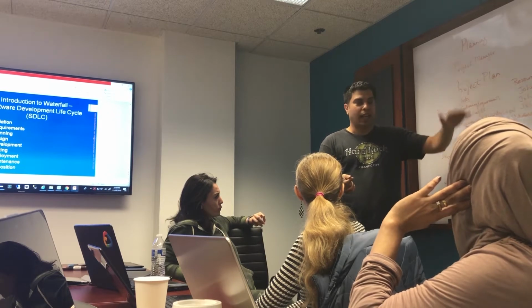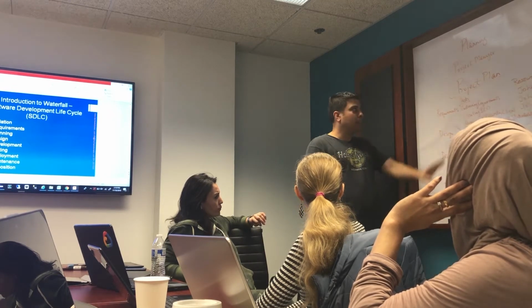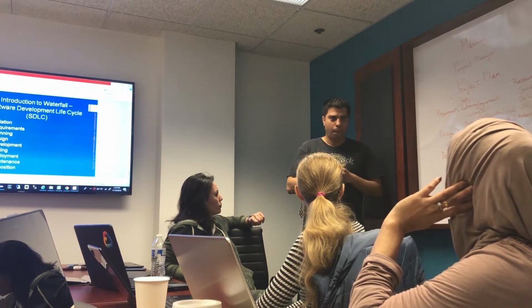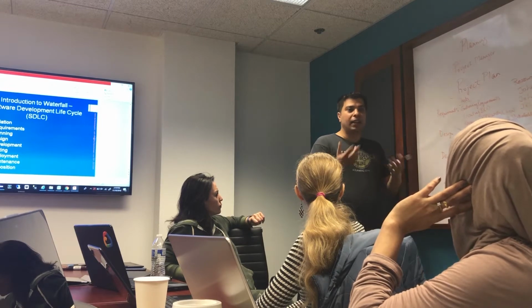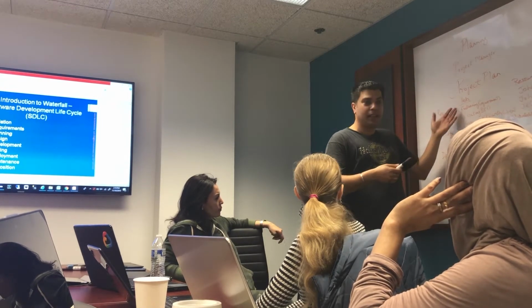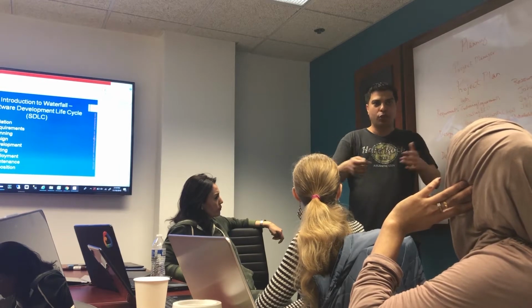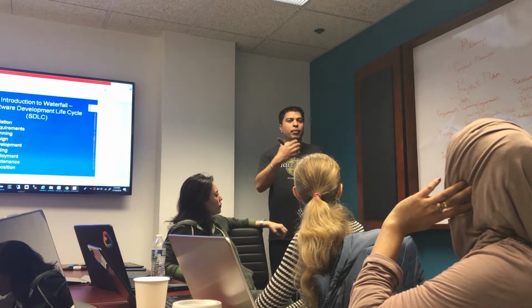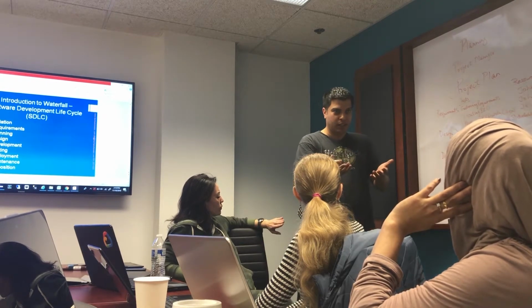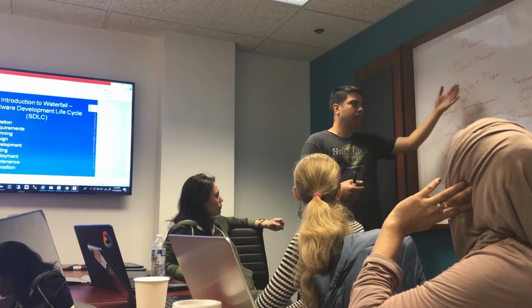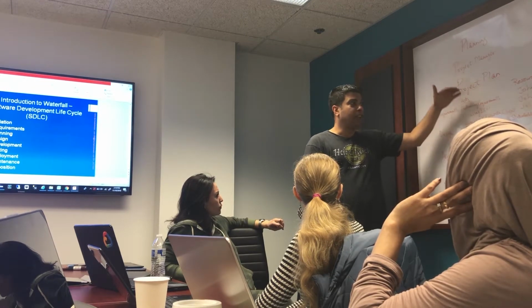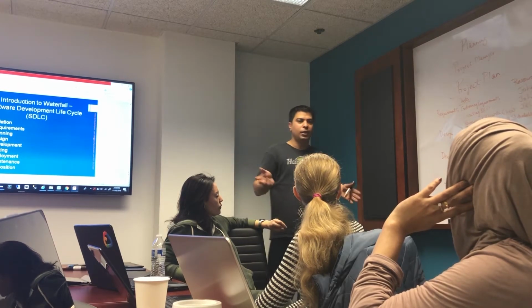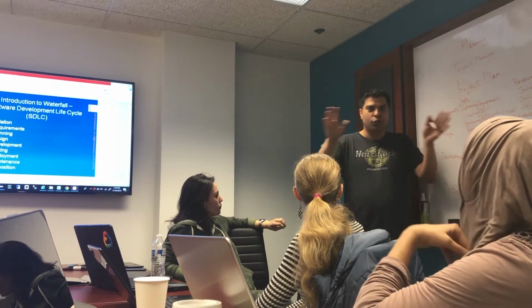The start date of the project is set, and based on this, the project manager gets an idea how long it will take to finish it, correct? And how much money we will need, because he knows everybody's salary, okay? And the cost of hardware and whatever is required, software, so he adds up everything and comes up with the cost and the timeline. So if that timeline is around the same as what the VP has told the client, plus minus 2 months, everything is good, right?